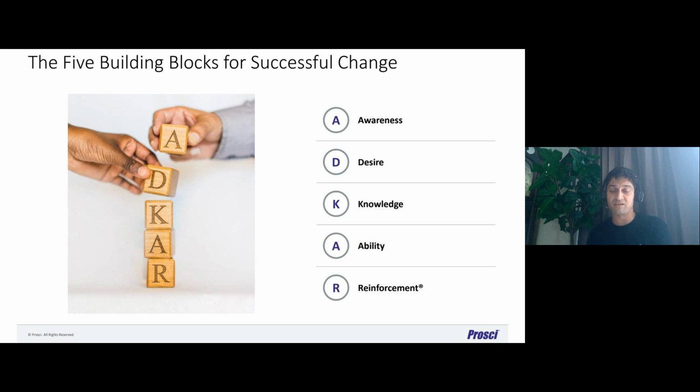Especially if you use different modalities, different comms modes like email, videos, WhatsApp groups, all hands sessions, and so on. The key message that you want to convey, you do need to repeat 5 to 7 times. As human beings, typically, we only really absorb and process it if it's repeated 5 plus times. So to me, this was a huge learning. And even in my day-to-day role, when I'm working with customers, I try to adopt this best practice.